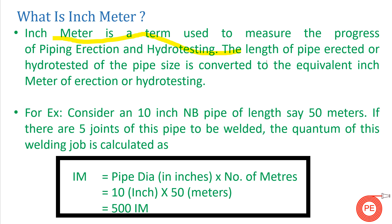Similarly, let's see what inch meter is. Inch meter is used to measure the progress of piping erection — how much pipe you have erected and how much pipe you have hydro tested during your commissioning stage. Using the same example: a 10 inch NB pipe, 50 meters long, with five joints. The formula is: Inch Meter = Pipe Dia (in inches) × Number of Meters. So here, 10 inch × 50 meters = 500 IM.